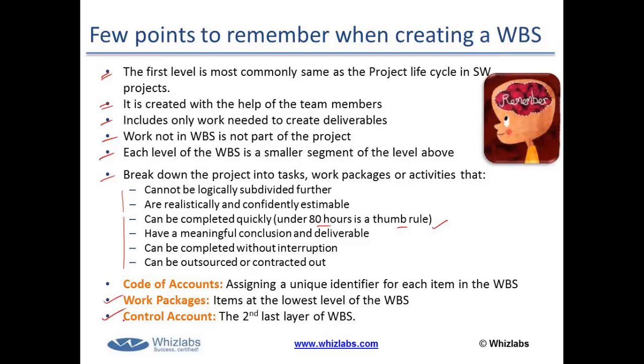The second last layer of the WBS, or maybe even a layer higher, which is used for controlling the project, is called the control account. We said that you do the planning, estimation, monitoring, controlling, etc. based on the WBS. But if it's a large project, it might not be feasible all the time to do the planning, estimation, monitoring, controlling, etc. at such a lower level of the WBS.